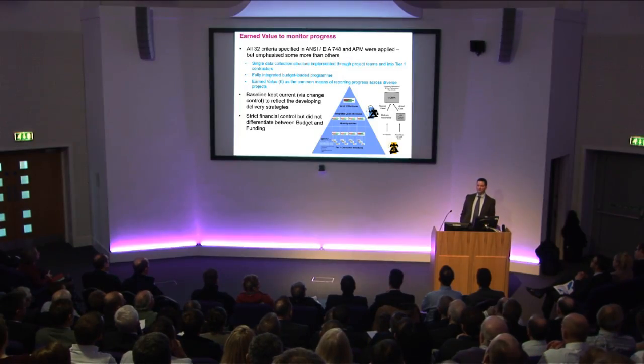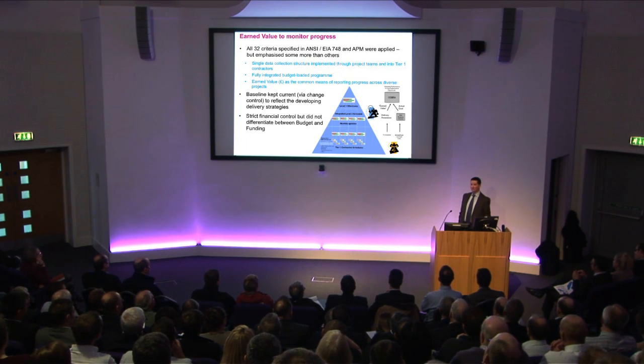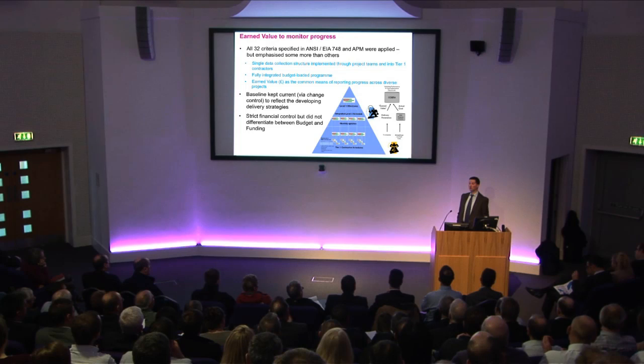There was the question earlier on about how detailed the baseline reports were. Zoe touched on it briefly, but one of the lessons that we took from the programme was we had too detailed a baseline at the outset. So in the yellow book, we had too much information in the baseline. The logic links were contained in there.